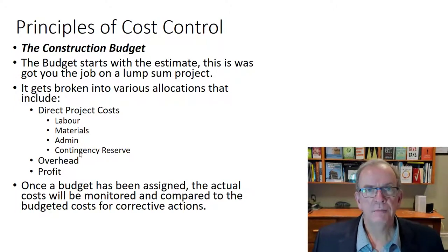And then we have, as a business, overhead. And overhead is everything that's not part of the direct project. It's the head office. It's the admin people back at head office. It's payroll. It's estimators doing all the estimates that you never get on a project. That all rolls into your overhead. It's the cell phones that everybody has, the trucks and vehicles that people are driving around to different projects. These are all part of our overhead costs, because you have to pay a fairly large amount of money for these things, and they depreciate to nothing over a period of time. So as a business, you want to make sure that those overhead costs are being accounted for.